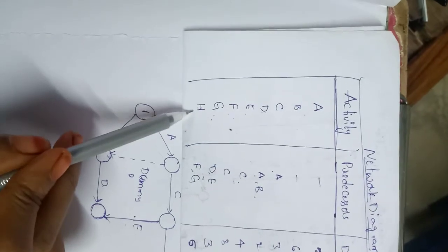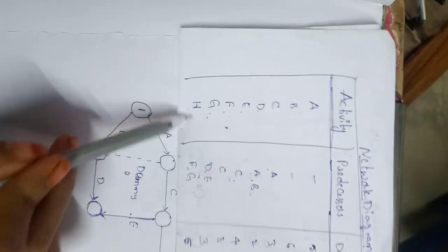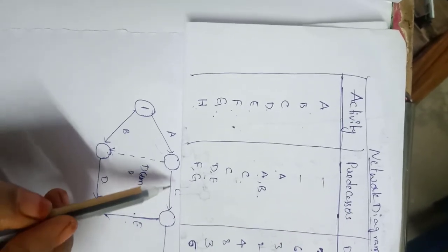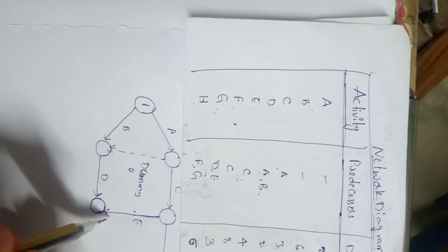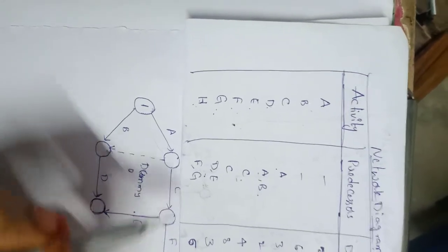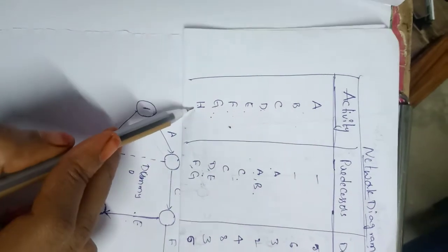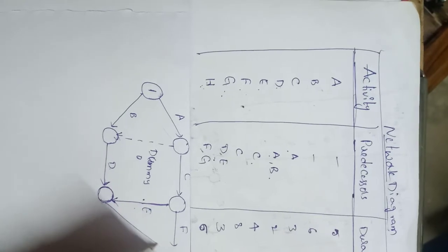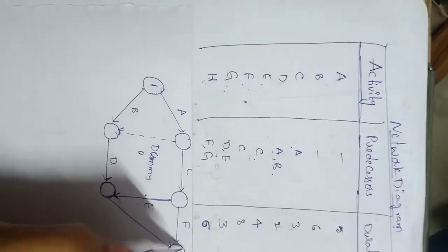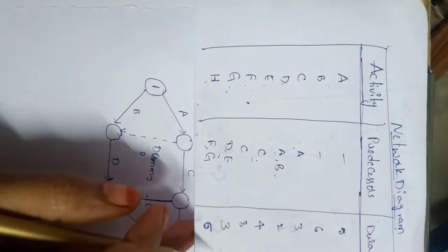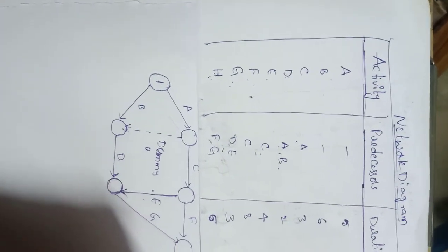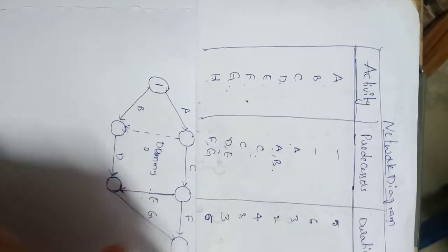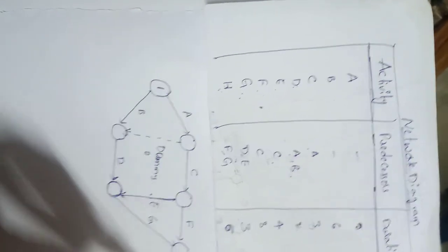But if you see the next activity H, it has F and G as predecessors. So from activity C, we'll be drawing two activities, E and F. F and G should be predecessors for H. So from this node we need to draw G. I'll join this G to the F node to build a complete network. From this last node, we have our common activity H. This is how we need to build an activity on arrow network diagram.